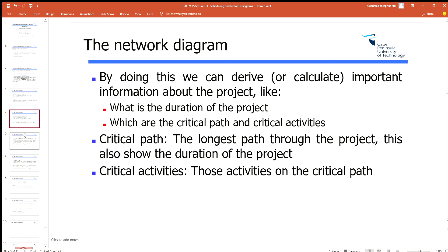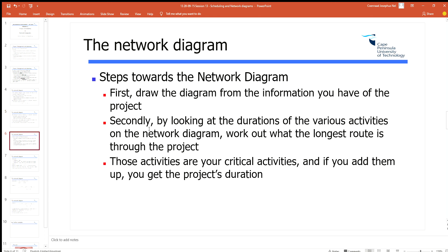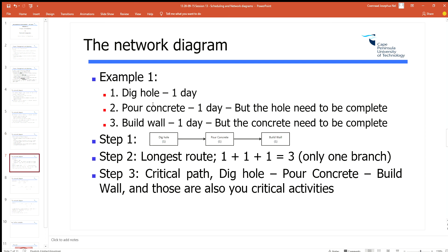There are three steps to follow. The first step is to draw the diagram — using the information available to draw it out. The second step is to look at the durations through the project to figure out the longest branch or route. The third step is to identify your critical activities — those which are on the longest route in the project.